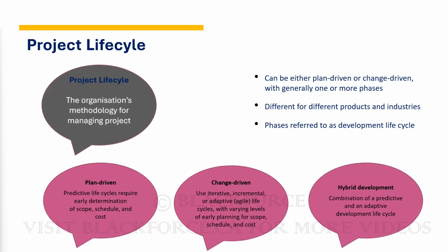Now, incremental is the one where you say you want to make a website, but you first start, let's do the home page. We'll do the home page. Everything is fully functional. After we finish the home page, you will now say, let's go to the about page. We'll also do the about page. We gather the requirements, we put it into iteration, we deliver that portion, and it is done. After that, we say, okay, let's go and do services, right? We now do that of services. When we're done, we now do that of contact. So that's what we call incremental.